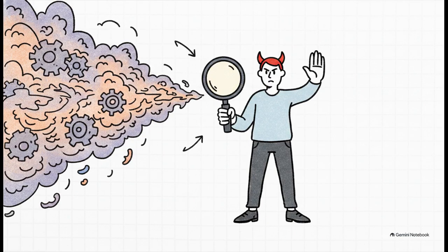And as part of that assessment, you've got to actively push back to avoid the dreaded scope creep. That's when you allow all these tiny, repetitive, incremental adjustments without ever checking the schedule or the budget. Honestly, it's a huge red flag that your process is broken. You know the old saying, the customer's always right? Well, throw that out the window here. You literally have to play devil's advocate on every single change request. Make them justify the business value before you even think about touching that baseline.